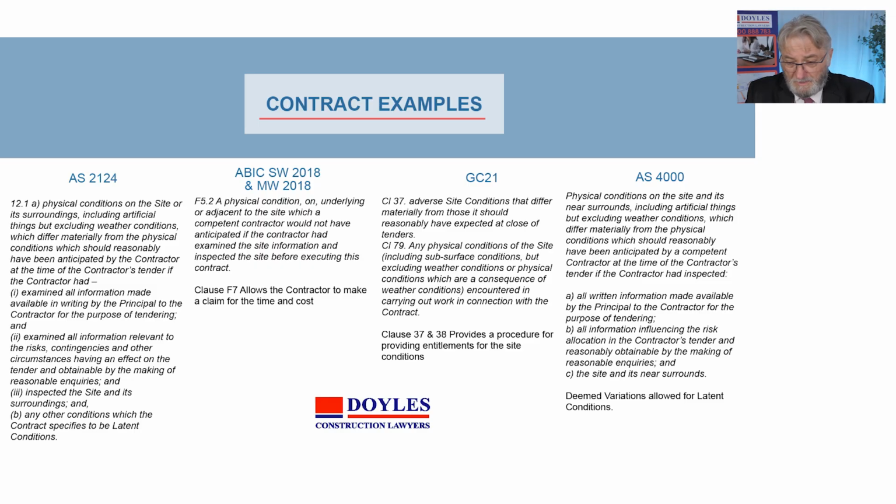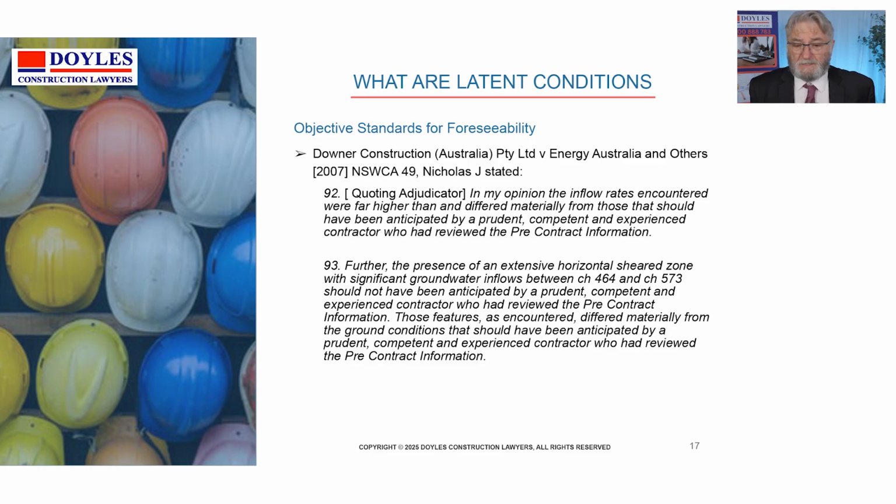If you're in North Queensland and physical conditions push you into the wet season, then the consequences of them are very substantial, and it's a large carve-out to exclude weather conditions from latent conditions. So you've got to look at what you're looking at when you price a job to make sure that you've allowed for those possibilities.